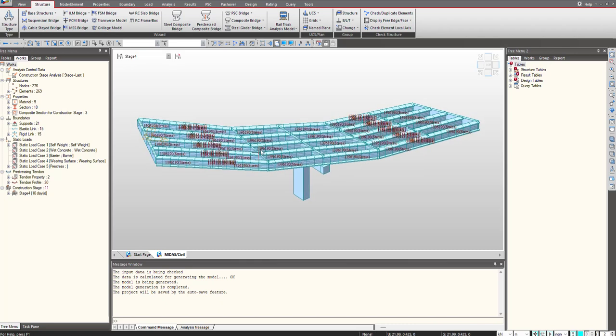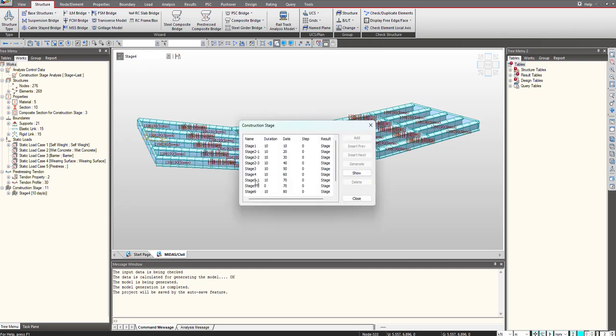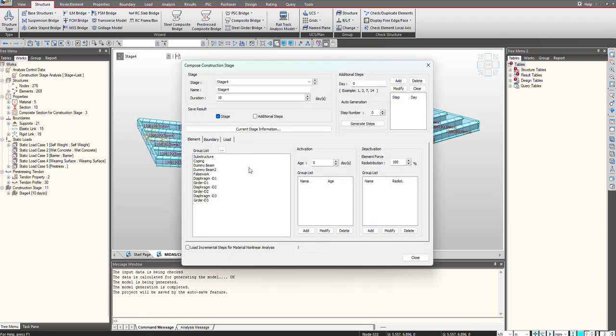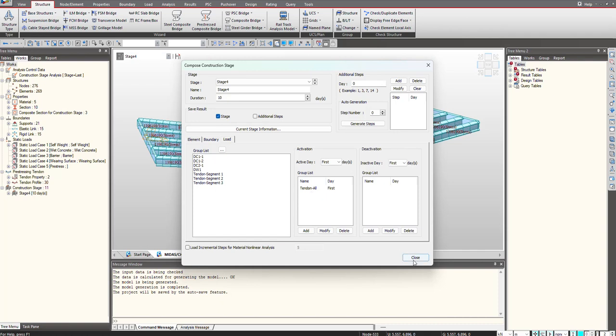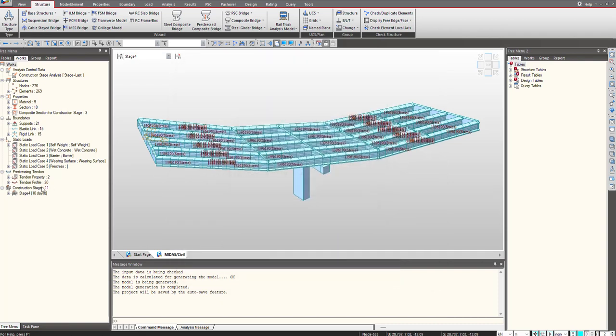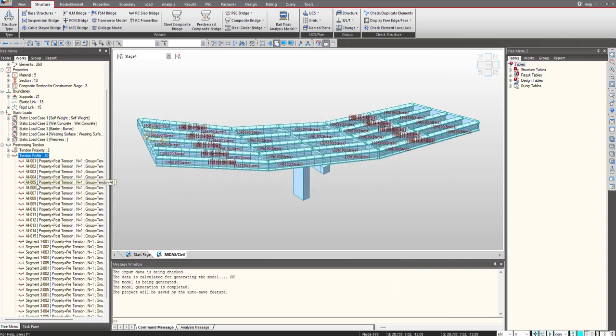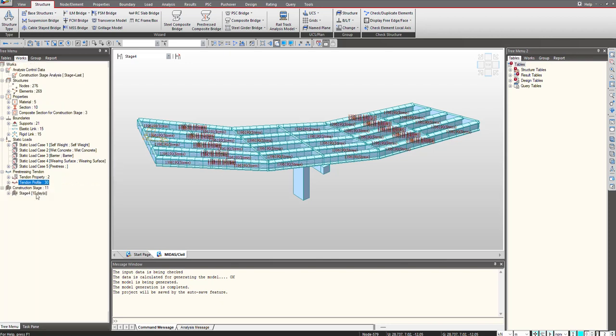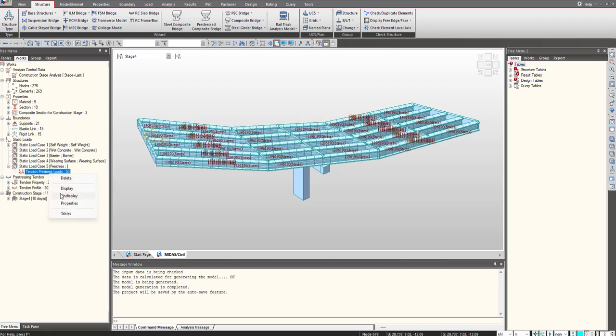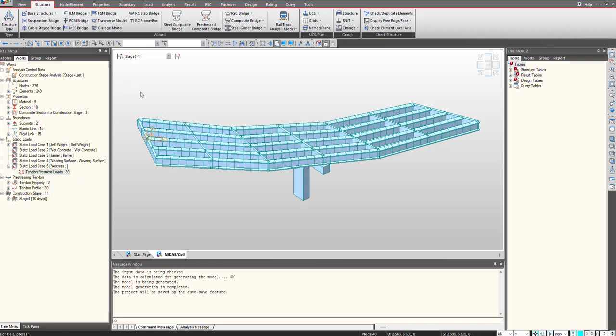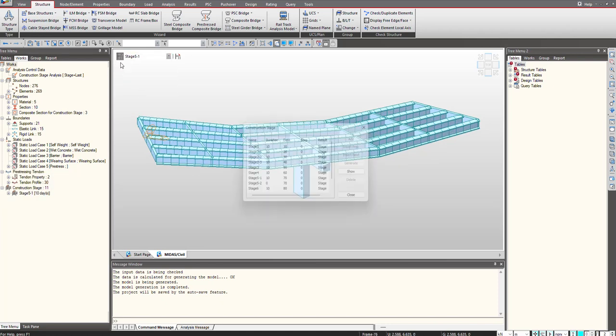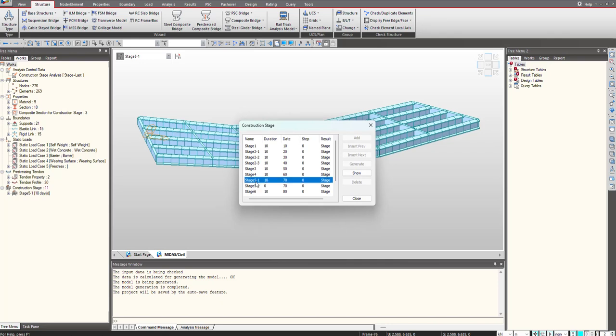Here the post-tensioning is done for all the tendons. You can see now the tendon profiles are 30 and similarly the pre-stressing loads are 30. Then when you need to check the stage 5, the superimposed loads, I would say the wet concrete load is applied in this stage. And then in next stage the casting of the deck has taken into picture.